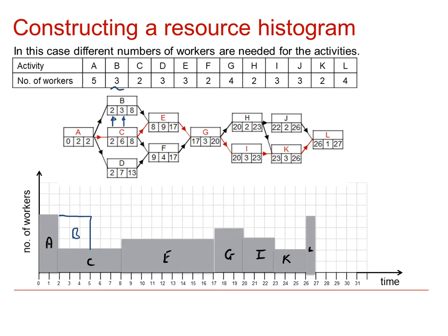D, on the other hand, is duration 7. It can start at 2 as well, and D is height 3. So we can start off with D first of all fitting in the first 3 hours in this position here, but then we need another 3 hours height 3, which would fit here, and then finally another single hour of height 3 which fits on top of E. So you can see there that D, quite complex, is made up of 3 parts, but each of those parts is height equal to 3, and we've got a total duration there of 7 hours.